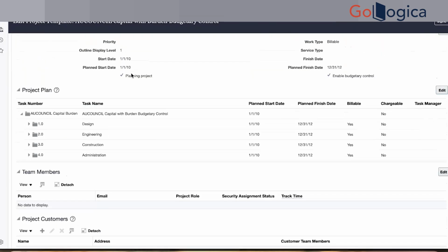And the other thing, tasks. You can by default add some tasks on the template. So when you create a project, it will copy all the tasks, so you don't need to create the tasks in the project itself. But we can also add extra tasks in the project side. Yes, you can.